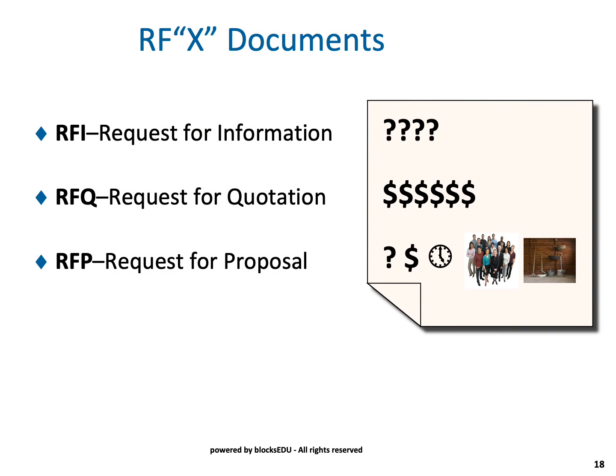So let us explore some of the documents that are used in procurement. Okay, first of all, there's a request for information, an RFI. Request for information is when you don't really know what you want, but you know that you want something. So what you do is you come up with a little guideline and ask people to provide information about how you would actually achieve something, and send it off to organizations that specialize in that.